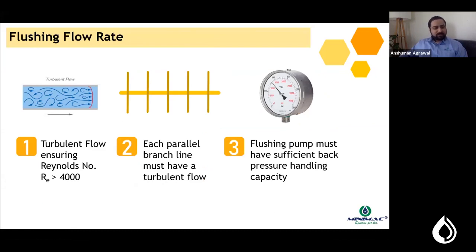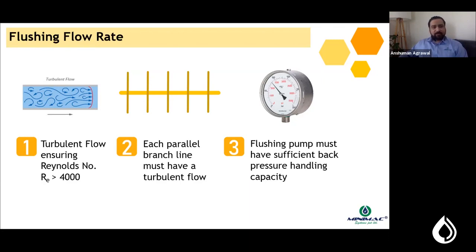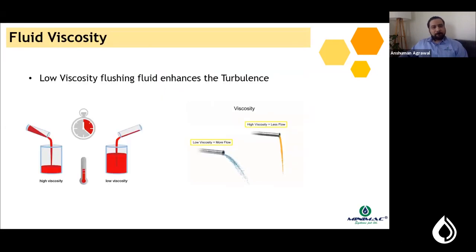Going deeper on flushing flow rate: turbulent flow requires a Reynolds number of 4000. When planning lube oil flushing for a pipeline network, each and every parallel branch line must have turbulent flow. The flow rate decided for the header line must be sufficient to create turbulence in every branch line and lubricating point. The pump must also be capable of handling the back pressure generated during flushing.